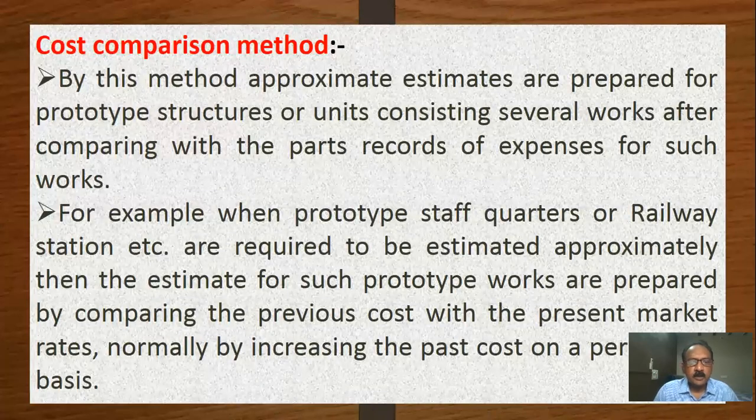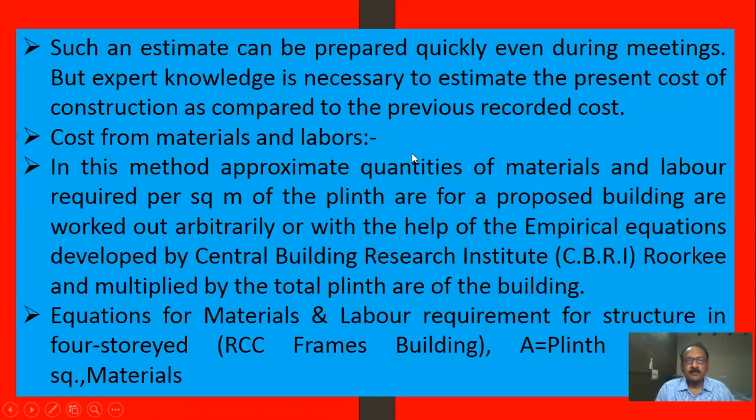Cost comparison method, which we discussed last class. In this one, we'll calculate each item's quantity and the cost of a prototype, that is, a nearby, similar building. This is one method, and it can be prepared very easily and quickly during meetings.